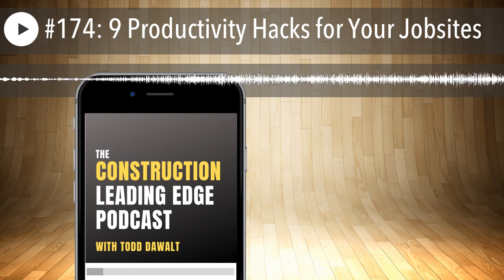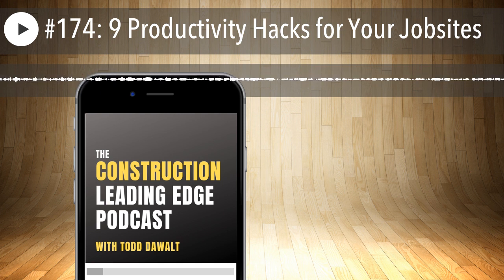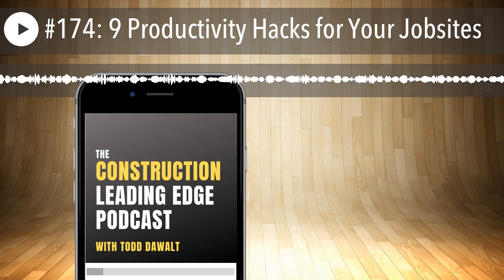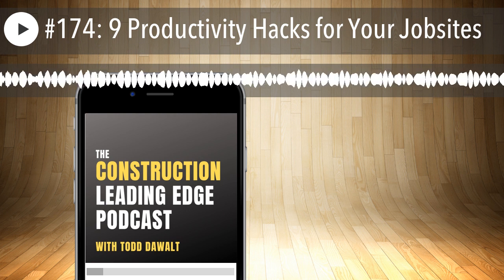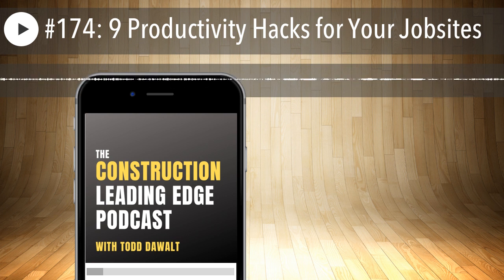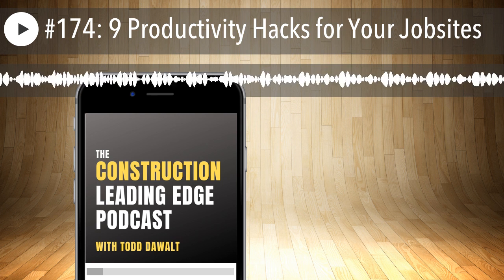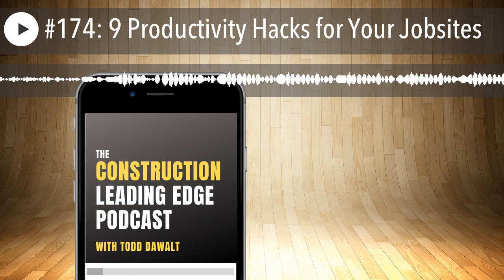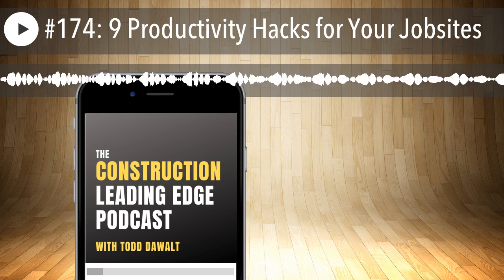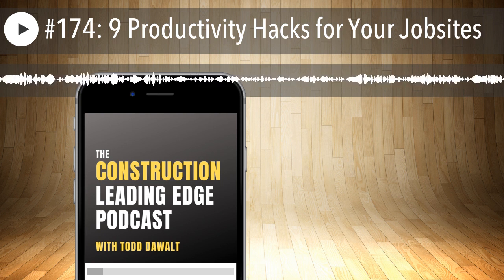So if you've ever built something, you know once you get things laid out, you get things started and you get in this flow, if you get interrupted, you don't just pick right back up where you left off. You have to reorient yourself, go back, check where you're at, check what you've done, and then start back over. So there's some rework and lost time. Not only the time lost from the phone call or the text, but lost time in going back and regrouping. And then imagine if that happens a couple of times an hour. It's not hard to imagine how much productivity gets killed there.